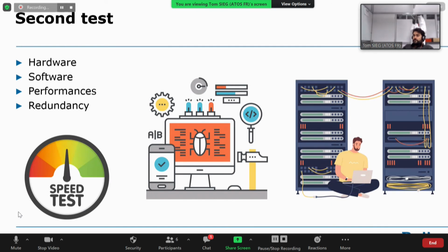And for the multi-node HPL, the difference is that compute nodes will work together. So at this moment, you will also test the network, the stability of the network, the stability of the access on each node together, and the access to the storage. That is the most simple test phase to put in place to check the hardware.